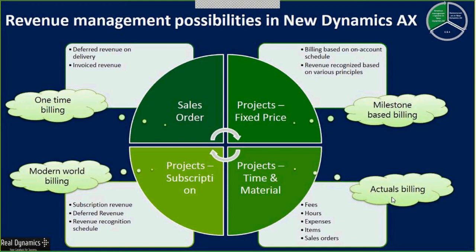Do remember, projects give the flexibility of billing not just one customer on a single contract, but multiple customers as well, which is not possible on the sales order. That's where the projects module is a key instrument in doing billing and revenue recognition, where a deal has to be managed in terms of a contract and multiple customer stakeholders are involved.